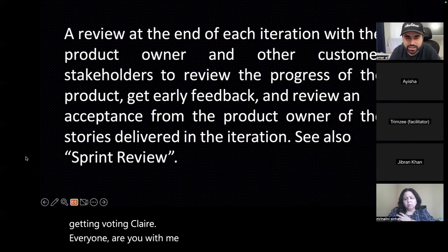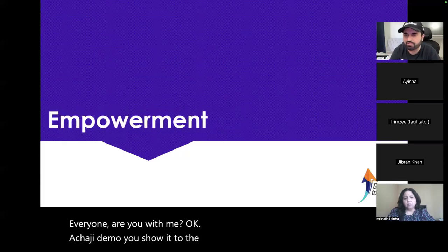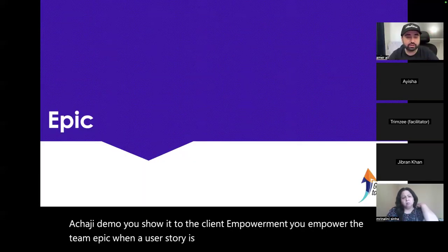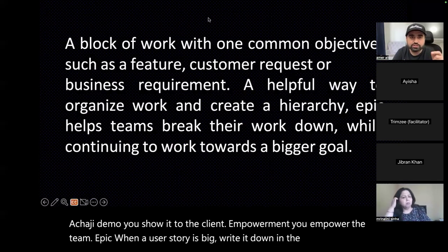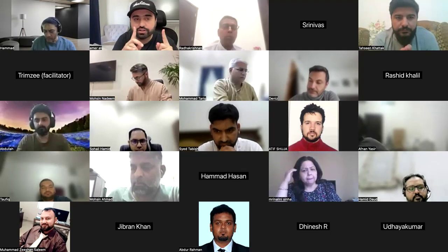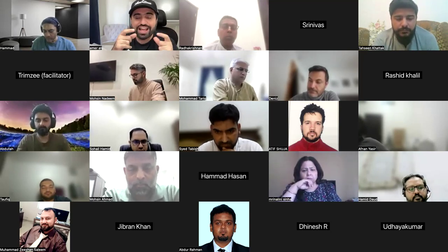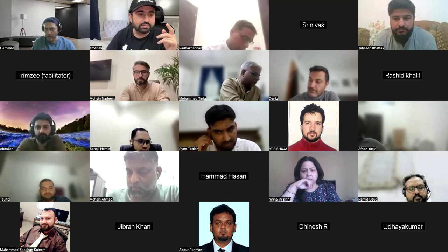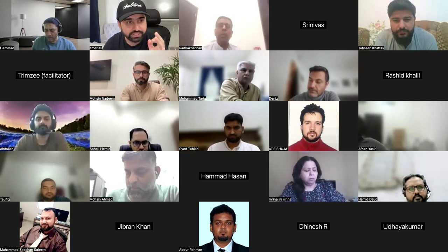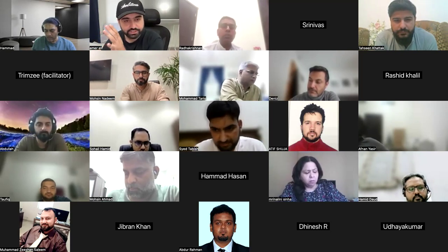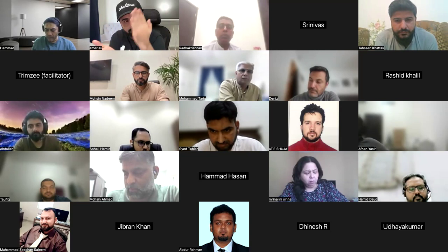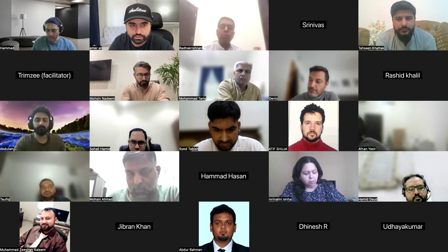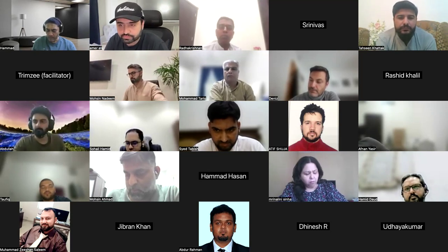Demo: you show it to the client. Empowerment: you empower the team. Epic: when a user story is big and you cannot complete it in one sprint, we call it an epic. A collection of tasks is another way to say it, but the right term is epic. What we do is slice it down, we decompose it into smaller ones. Epic.